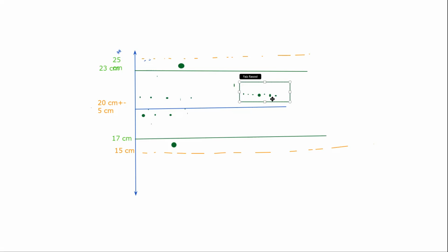Okay, this is called rule of 7. It says if there is a rule of 7, even if it is still under our control limits, upper or lower, still it is an assignable cause. Reason, it is not a random variation. There is something there.